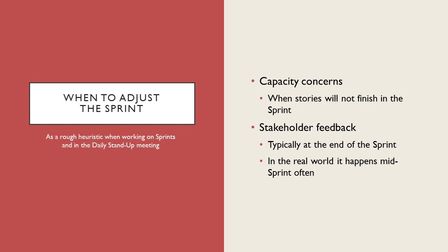The parking lot is a tool to use in any meeting, but especially in daily stand-ups. And the parking lot is essentially saying, this is a great conversation, this is a great topic to continue, but this meeting is for a specific task. So the idea of a parking lot is, let's say there is a blocker and the developer starts discussing the details of it. You can say, let's move that to the parking lot, and assign a resource, maybe another developer, a senior developer, to help with that. And those two individuals after the meeting can address that and handle it there. So essentially, it's a way to move on from a topic while saying you will address it later.